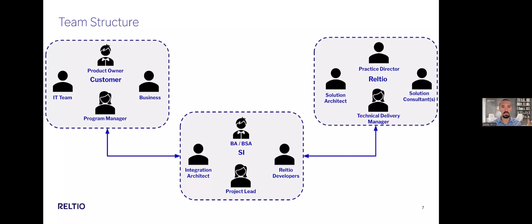There have been a number of times that we've seen, and I'm sure everyone has seen on IT projects, where perhaps the wrong business owner was involved, sign-offs were made, and then you come to user acceptance testing, and there's a broad revision, which can affect the data model in our case. We really want to avoid that. We want to make sure they get input, buy-in, et cetera. It's a critical piece there.